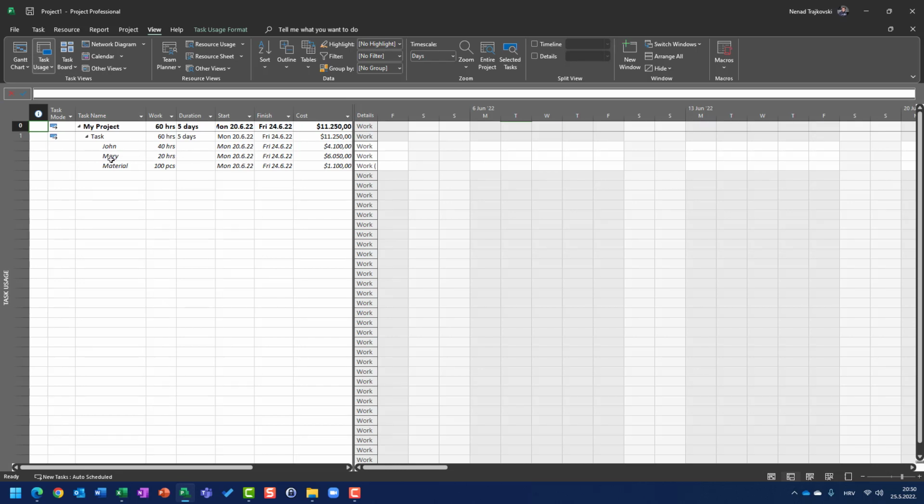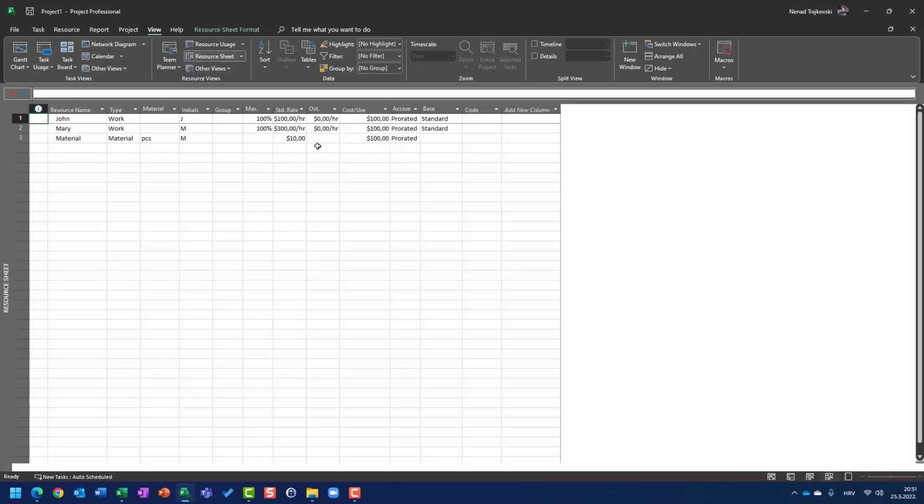So since Mary is assigned with 50%, it will take 20 hours multiplied by her standard rate plus 50% of this $100. And last but not least, material.